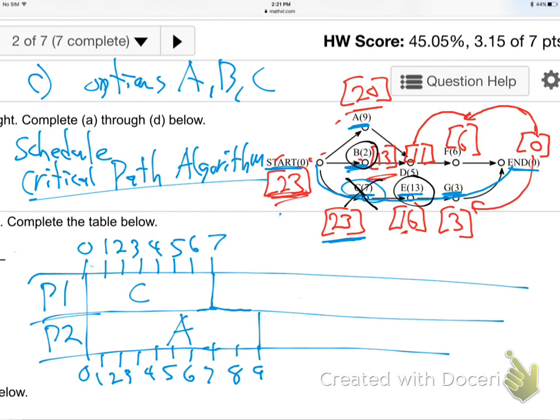Yeah, E has the higher bracketed number. It's got the more critical path. So again, it's not because of the parentheses. If I was doing decreasing time, it would be because of the parentheses, right? But when you're doing critical path, it's all because of that bracketed path number. See the difference there? So the higher bracketed number means we choose E, because that means his road is longer. There's more work behind him. So we choose E, which is a 13-hour job.